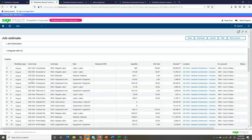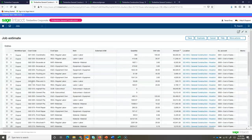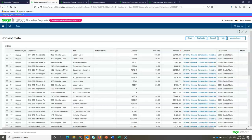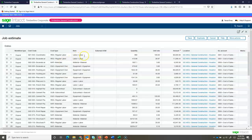Taking a look at the entries on this screen, I see that same work breakdown structure that I saw from my cost codes. Now, these cost codes are designed by you. You can import a list of cost codes, perhaps the ones that you're currently using. Beyond the cost code, we can break down this cost further in looking at the cost type and even a cost item.